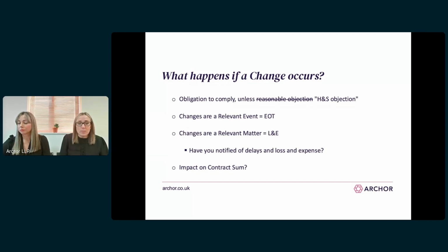I think it's been covered in one of the previous sessions that these timeframes are quite often amended to quite short periods, and that they become condition precedent to the various recoveries of an extension of time or loss and expense. Thereafter, if the change causes a delay to the completion of the works or a section, and the contractor has already properly notified of that potential event occurring, the contractor will be entitled to an extension of time and loss and expense. Changes may also have an impact on the contract sum, and so I'll now look at how changes are valued in that respect.